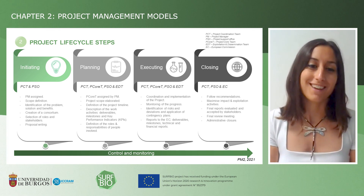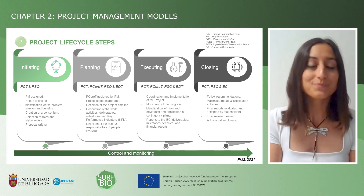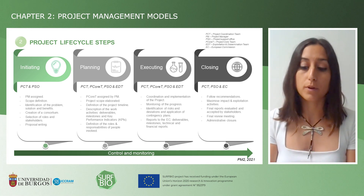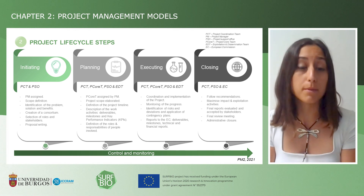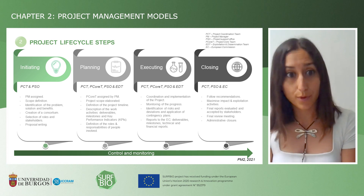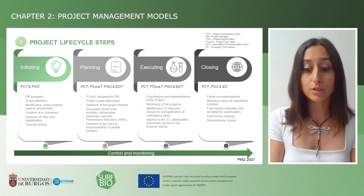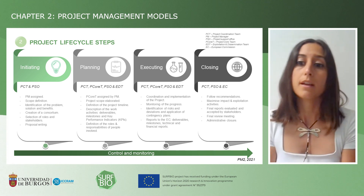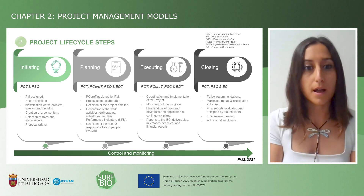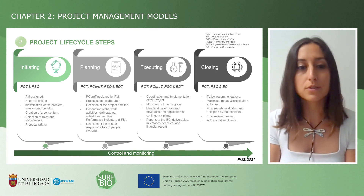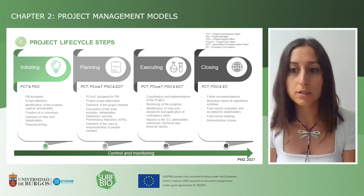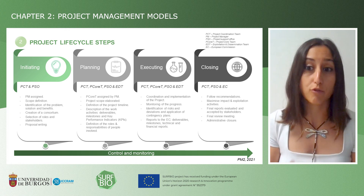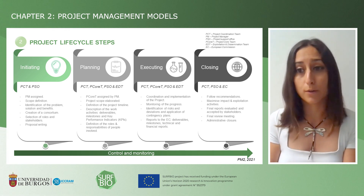Once all this is defined, we move on to the executing phase. The executing phase implies the coordination and implementation of the project, monitoring of the project's progress, and the identification of risk and application of contingency and mitigation plans. In this phase, the coordination team needs to report progress to the European Commission with deliverables, milestones, and technical and financial reports.